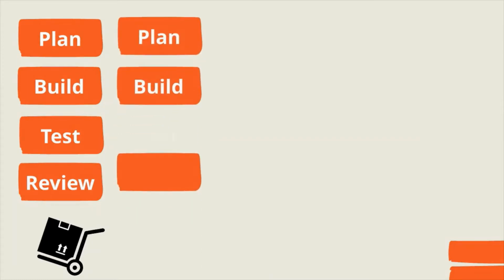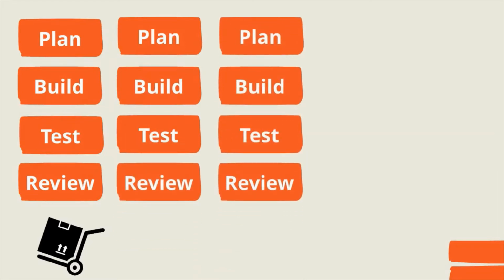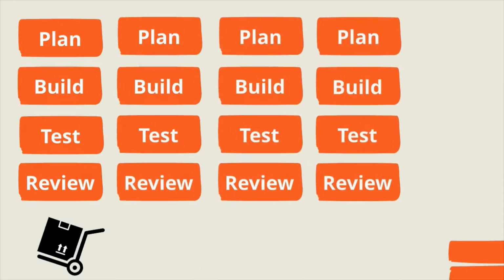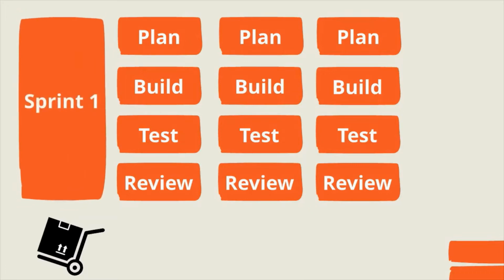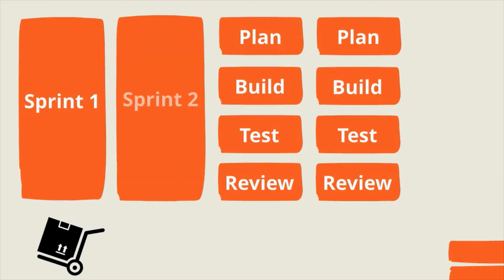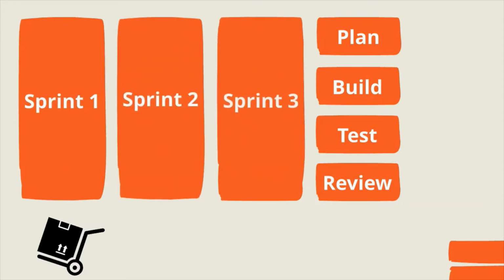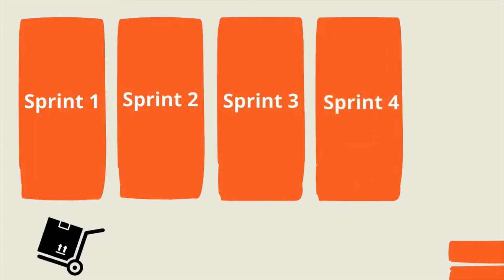This is then repeated continuously, reducing the time from planning to development to testing. Each time we repeat the process, we do just enough planning to complete the incremental release. We end up with several incremental releases called sprints. A sprint usually takes from 1 to 3 weeks. We will then repeat the process until our product is feature complete. At times, we end up shipping the product after the second sprint, or third, or even further, but we'll end up with a shipping product.